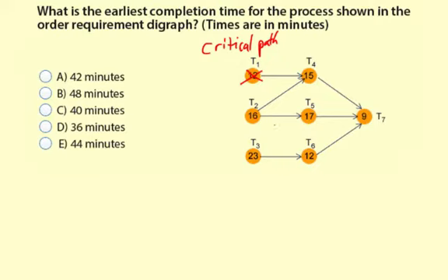And then I can compare down here coming off the 16, going from 16 to 15, then to 9, and then 16, 17, 9. I know the 17 is going to be greater than the 15, so even without adding the totals, I know this 15 is not going to be used. Okay, now we have it narrowed down to only two paths left.